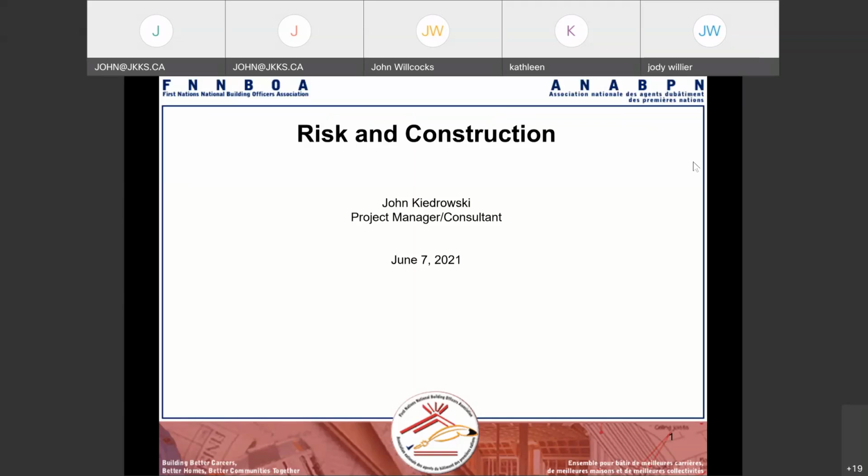So the community has to create their own warranty. Their own warranty would say, okay, if you're going to build this house, we're going to hold back 10% for, say, 6 months, 8 months, and we'll pay you interest of 2% as our warranty.